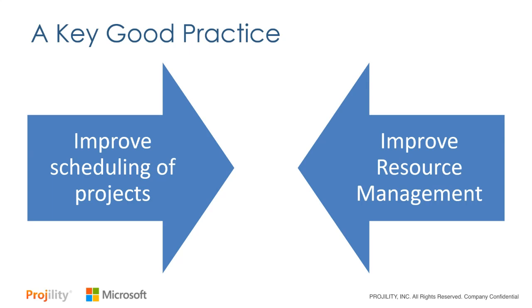An example of this in some organizations we work with is setting up time tracking at the task level on a project, but they manage the detail work separately on Agile projects. Work gets performed in your Jira or DevOps system, but they track time in Project. So Project becomes your time tracking system for Agile projects, but Jira or DevOps is your work management system, right?